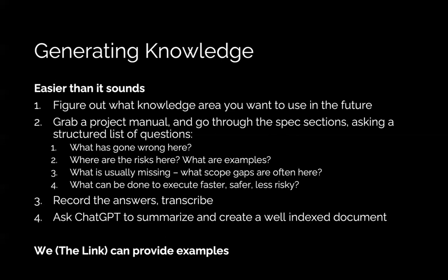And again, this is pretty low level stuff. This isn't really senior level judgment. This is more like, hey, here's some things you might look out for. The kind of lessons learned, but here you're indexing it against, in this case, I would suggest indexing it against MasterFormat, because then you can find other places where it'll be applicable. One of the problems with knowledge management always is, how do you make it useful at the time of use? And indexing it against what project manuals are organized by just seems like an obvious way to do it. You don't have to do it that way, but that's just an easy one for me.